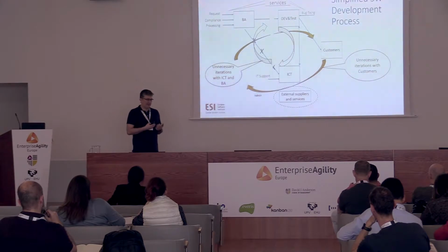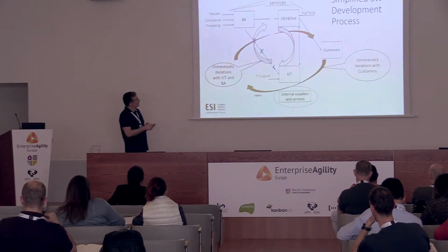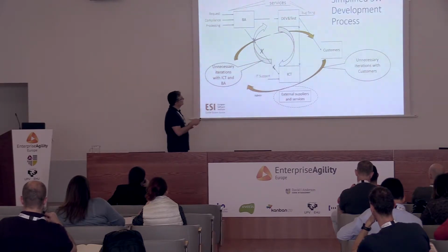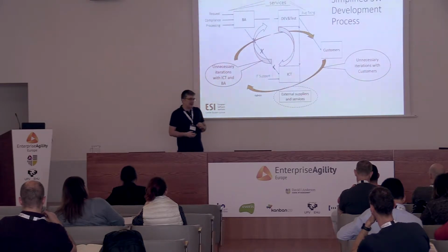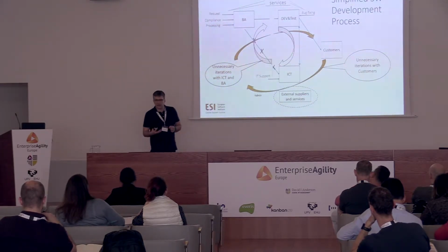You work with them. But the others are put aside, and they wait. And when you process a requirement that was 3-4 months in the system, you need this iteration to deploy it because ICT is not aware what is coming. And then when you deliver to the customer, there is high probability that it is not fit for purpose.